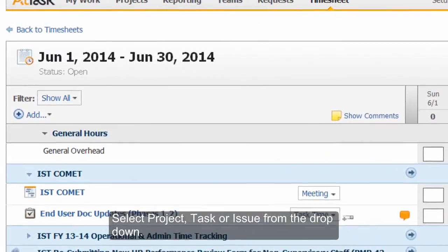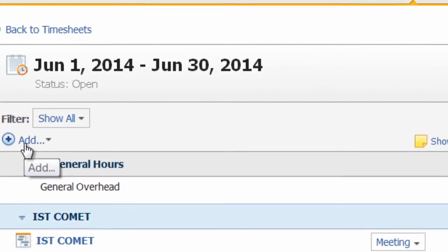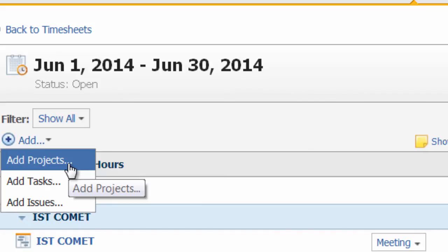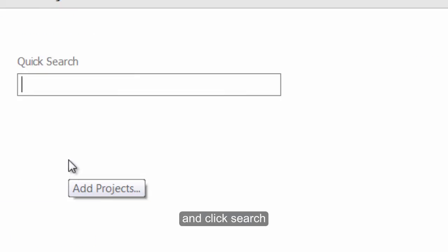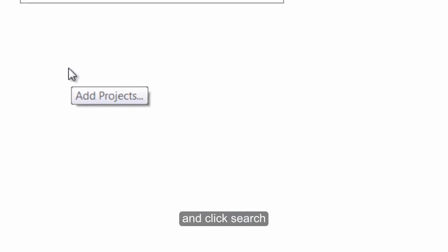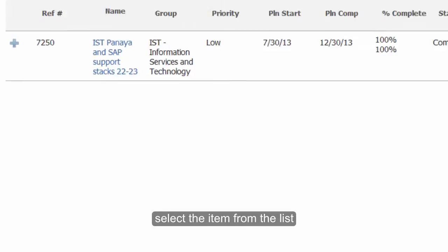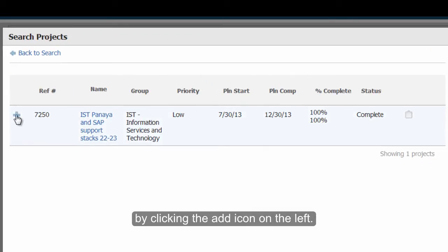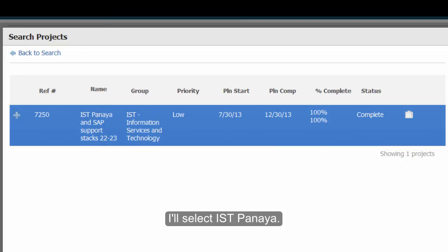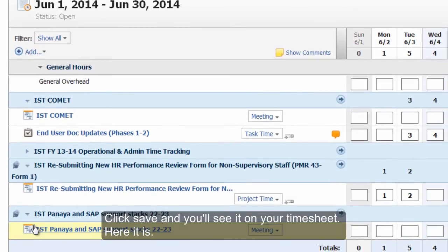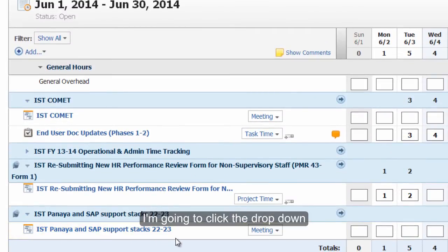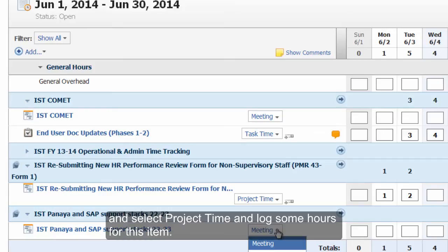Enter the search term and click Search. Select the item from the list by clicking the Add icon on the left. I'll select ISTPANEA. Click Save and you'll see it on your timesheet. I'm going to click the dropdown and select Project Time and log some hours for this item.